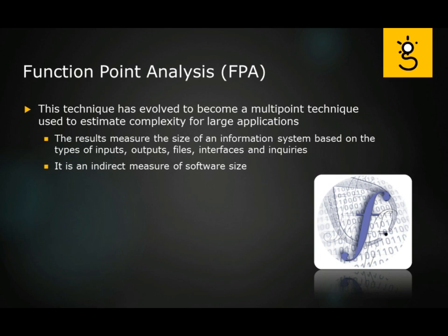the types of files that we're using, the interfaces used by the users, the GUIs, the graphical interfaces, and the types of inquiries they might make. It is at least, you could say, an indirect measure of the software size.